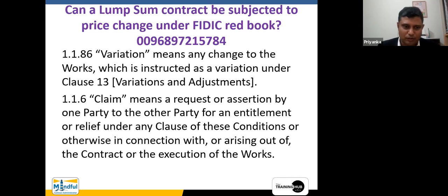I am not going to design for, and I am not going to perform the execution of the works for, a European code. That is a relief. But as far as the entitlement is concerned, the contractor might have seen some ambiguity. As per the priority of the documents, he has priced the specification, but the drawings have more detail. The contractor can say, I priced in accordance with the order of priority, and therefore this particular aspect of the drawing has not been taken into account by me. So there is an argument for entitlement. Not all cases will win like that, but anyway, there is an argument. So that is the difference between an entitlement and a relief.